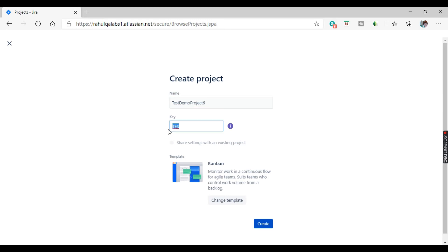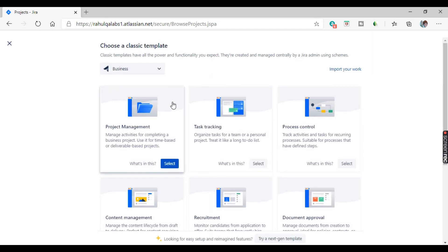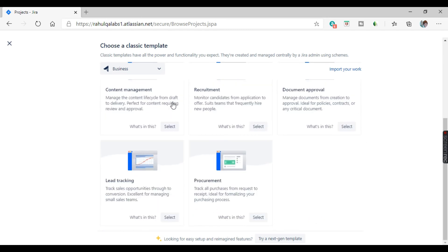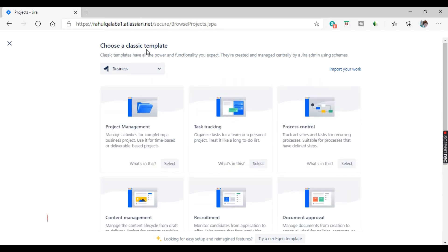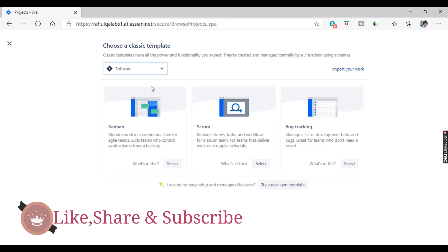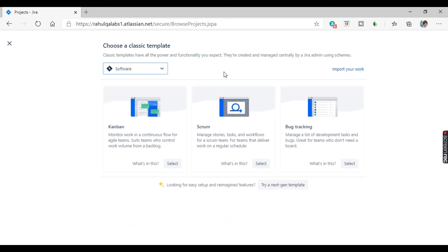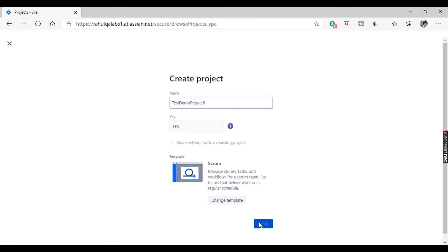The key has already been generated — that is the 'TES' key — and this is the template. You can change the template if you want. If a project follows scrum methodology you can select scrum, or if you want Kanban you can go with Kanban. It's asking to choose a template; we can see software options — Kanban, Scrum, Bug Tracking. I'll select Scrum and click on Create.